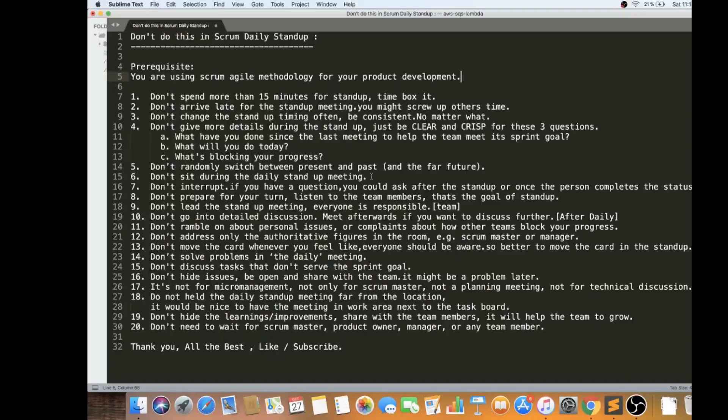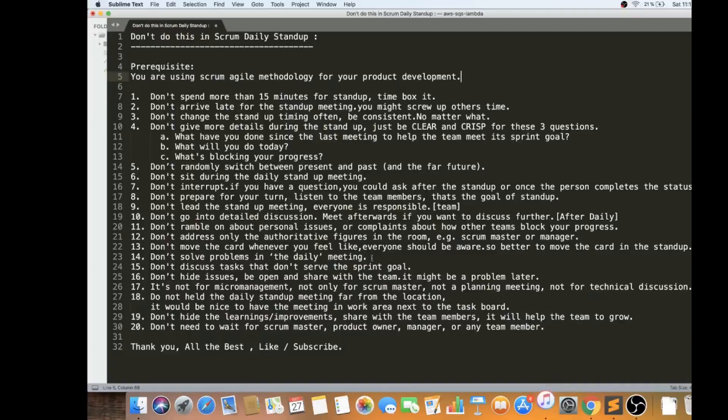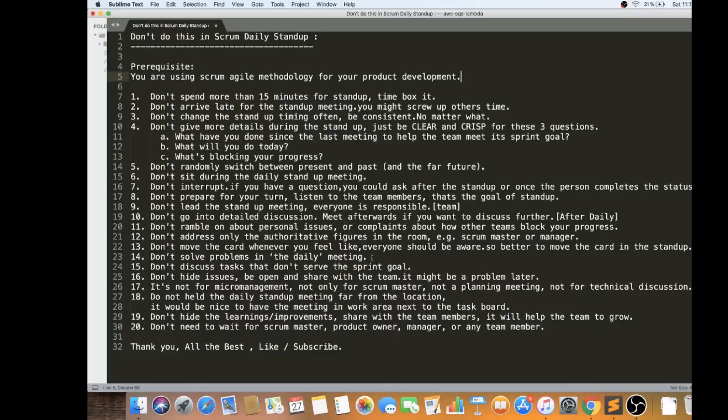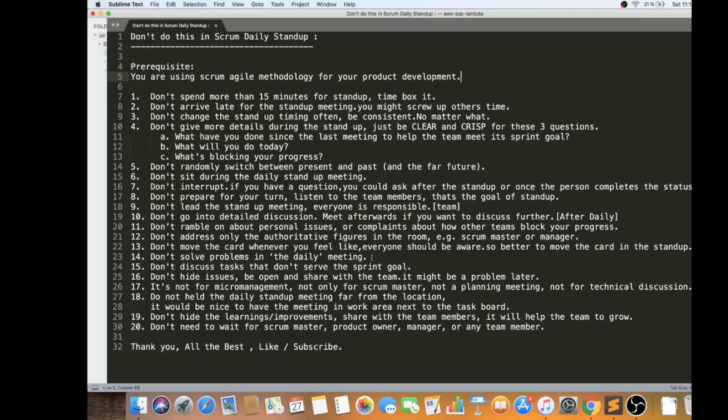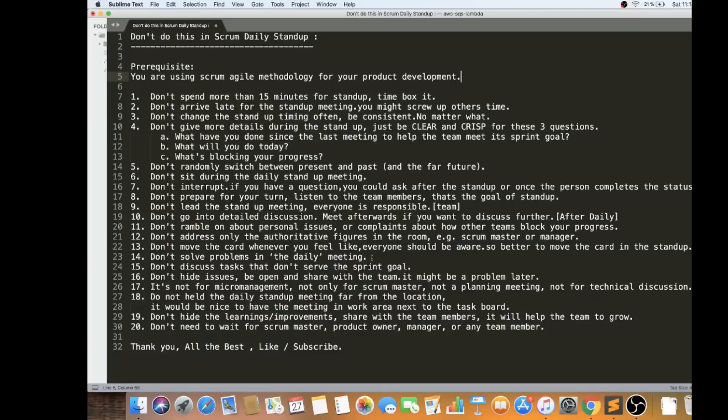Don't move the card whenever you feel like. Why? Because everyone should be aware what is the state of the task, how it's been achieved. Better to move the card always in the standup. Don't move whenever you feel like. Whenever it's done, don't do it immediately. You can wait for the next day standup and then you say I've done with this task. Then I'm moving it to done and then I'm also working on this. Don't move the card whenever you feel like. Always do it during the standup. It gives a feel, it gives a view that how the card has been moved and who has done something like that.